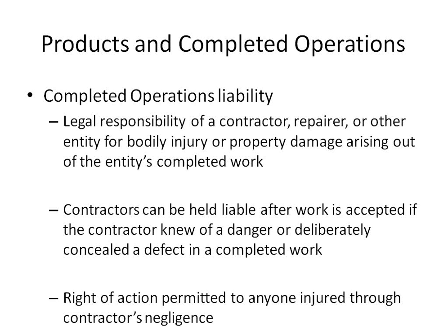So the idea being that I built something, and again, from a contractor standpoint, I've accepted the work, but I later find out you kind of knew you used bad materials, you used substandard materials. I can then go after you because I was damaged in the process, and because you knew about it.